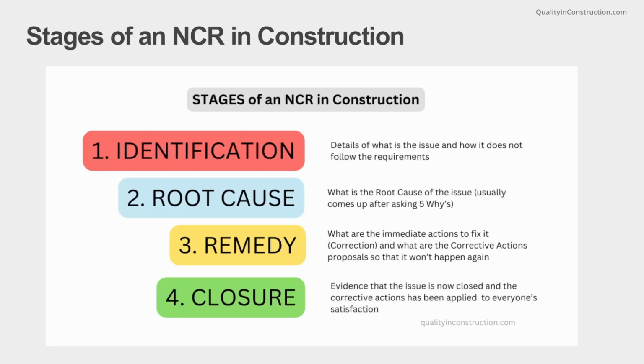Then, there is the root cause. This is a typical root cause analysis that is an exercise that must happen in every NCR that occurs and must also be recorded on the NCR form itself. It is important to note here that for smaller issues, a detailed root cause analysis might not be required unless it's a repeatable issue that becomes a trend.